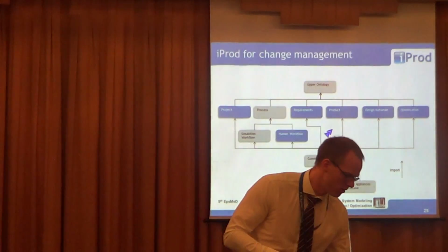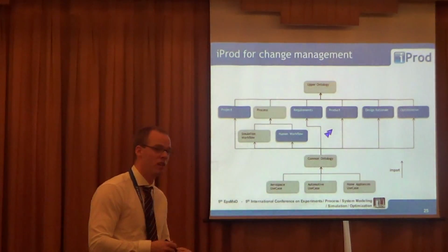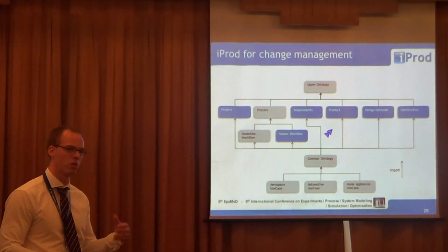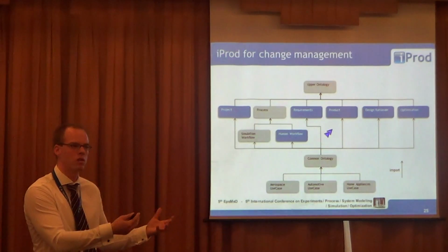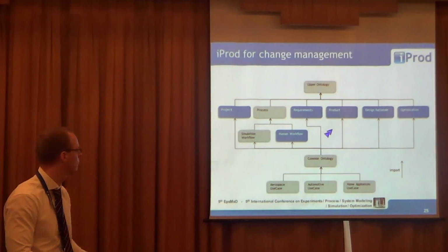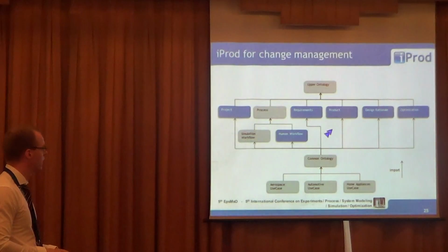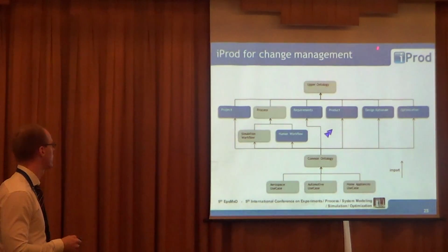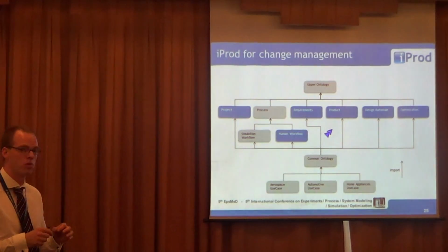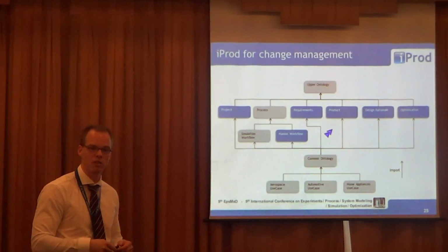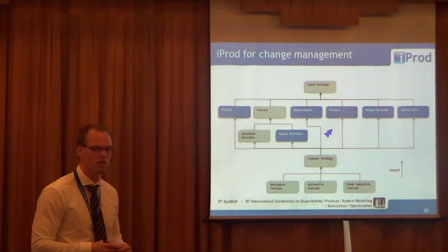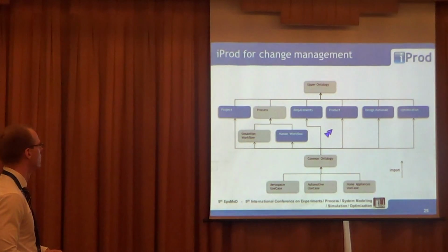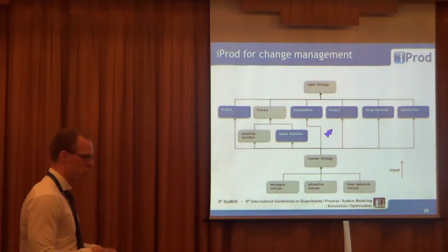Obviously, changes can affect many different areas in your project. It could affect the project plan, which is usually stored in some kind of project management system, like MS Project. It could affect requirements, since you change something and somehow the specification is affected. It could affect other product structure elements. If I change the weight of one component, then somehow the others usually have to save weight. And in the next steps you will see.